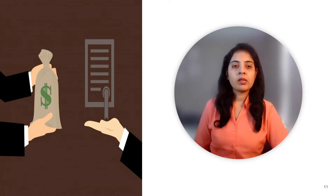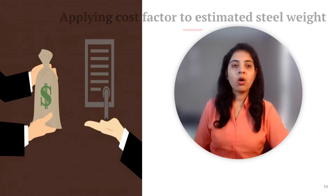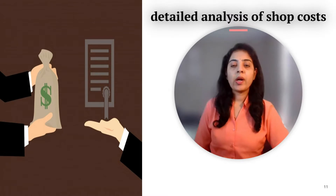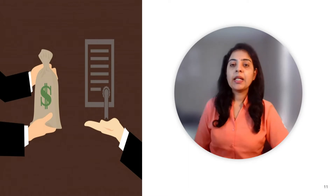Cost estimates are prepared either by first applying appropriate cost factors to the estimated steel weight, or by estimating the cost of preparing shop drawings from analyzing the quantity, sizes, and shapes of pieces to be fabricated, and making a complete and detailed analysis of shop costs.